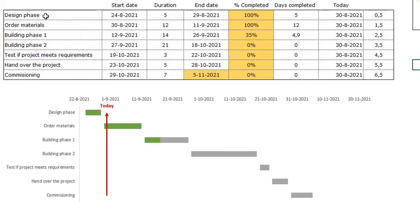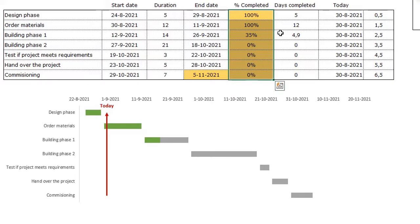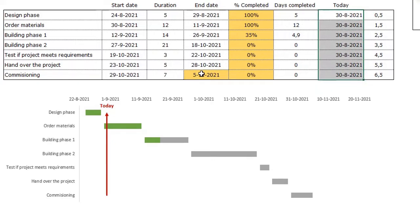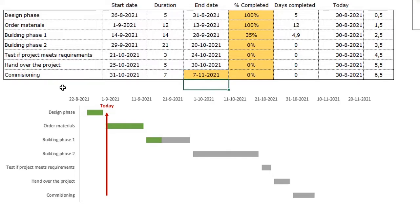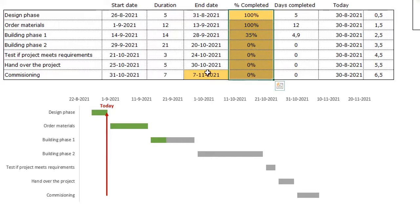In our data, we have the different tasks, a start date, a duration in days, an end date, the percentage complete, and the days complete. This is also where today's date sits. It uses backward scheduling, so we only need to enter the end date of the last task. When I change this to, for example, 7 November, you see all dates change based on our project due date. The percentage complete is highlighted in yellow, indicating it needs to be filled in. I can change this to 60, and you see the days complete updates accordingly.